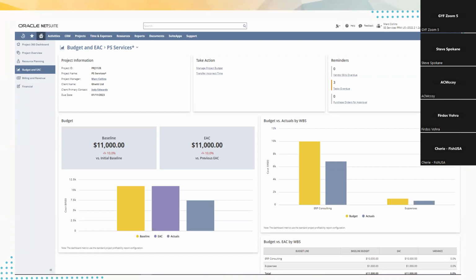If you're doing your internal services, every resource assigned to a project is assigned a service item, and that service item has an associated cost, and you can set up billing rates if you're doing time and material versus fixed. So there's some setup involved, but once you have the project set up, you can start creating what a baseline is for the project. So right when the project's created and you implement the budget onto that project, you hit something that's called establish or initiate baseline.